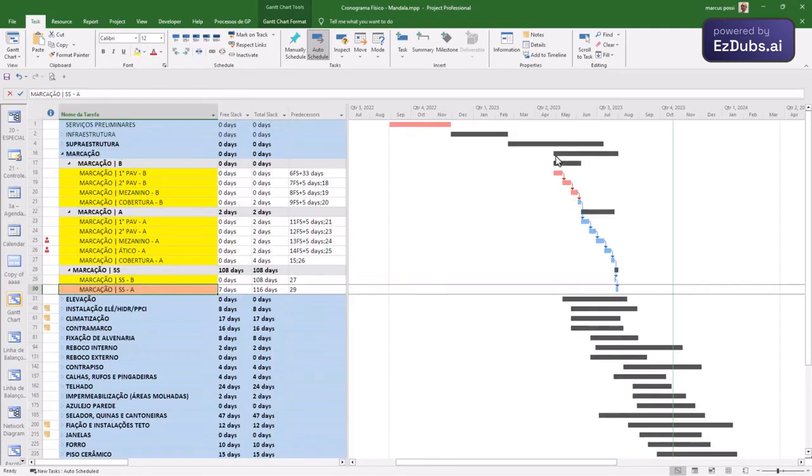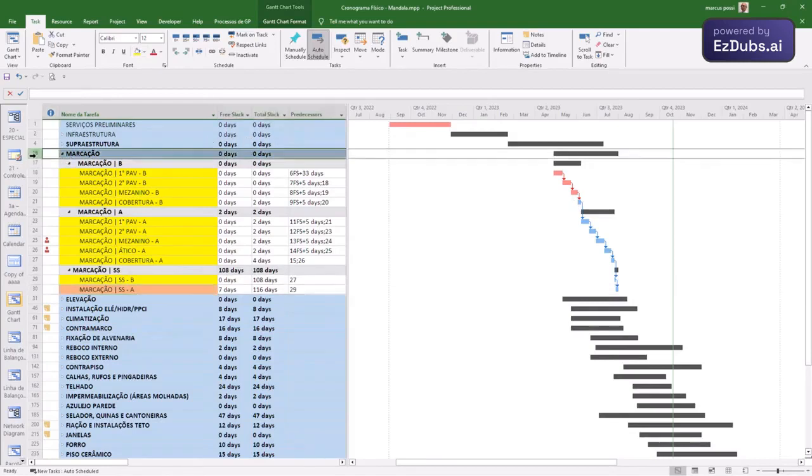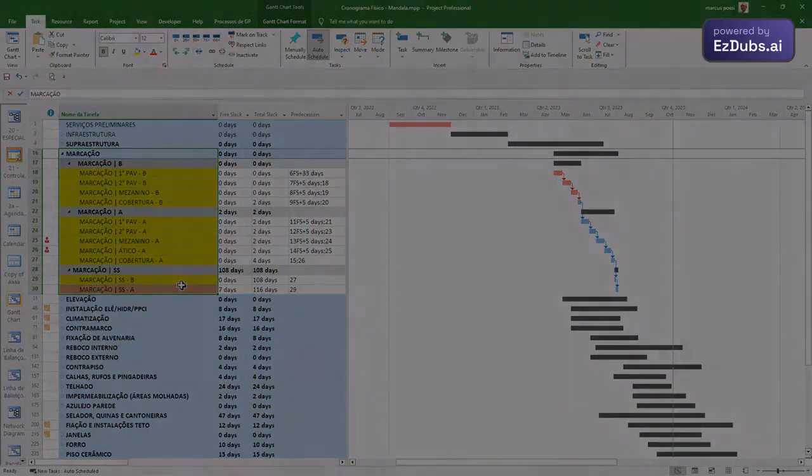The total marking work became shorter, but it was not ignored. It became shorter, so we have 0 idleness. The team works and receives when they work in the activity. The team only receives when they are available. Here we have 100% optimization of team use. Let's move on to another tool.